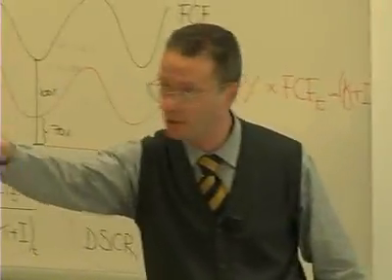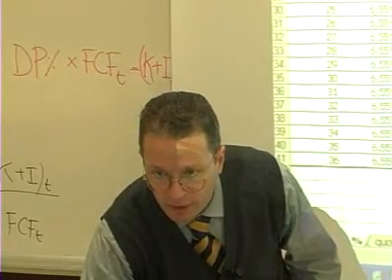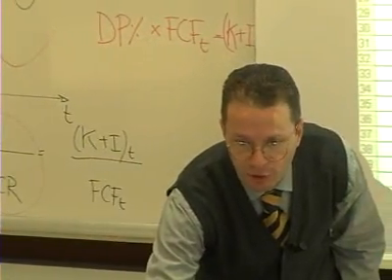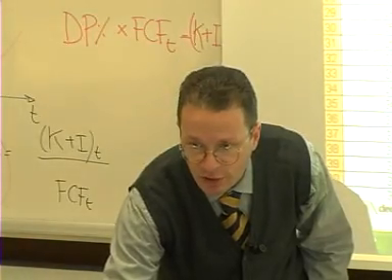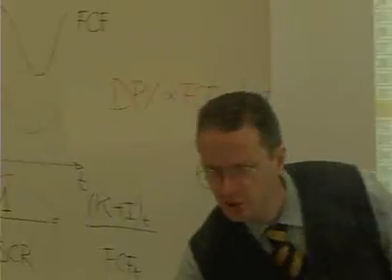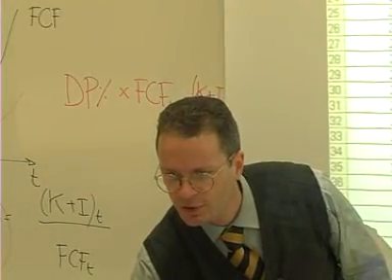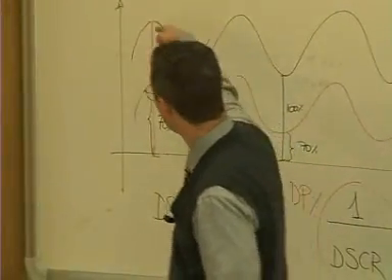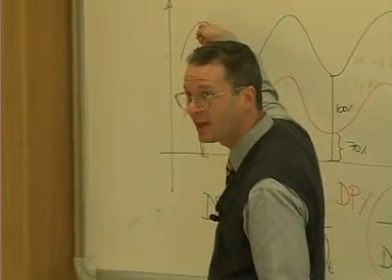Again, this is an example you have in your material, so you can simply follow on the screen. The relevant variable for you in this case is the dedicated percentage. The dedicated percentage is 70%. 70% is the inverse of the debt service cover ratio. Look at this part of your exhibit. Look at the debt service cover ratios. The value of the debt service cover ratio is always constant, and it is obvious. The distance between these values and this value is always constant. It is always 30%.